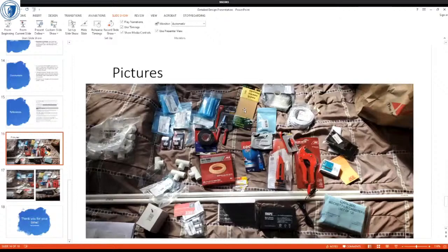Okay, and the other thing is sort of relevant to Coffee King as well. When you're in a company and you buy stuff for a project, there's usually at least two buckets that you pull the money out of. One bucket is the expendables, the project budget, and the other is the capital budget. And the capital budget is usually where you go to buy stuff like tools and things that are going to have a life after the project.